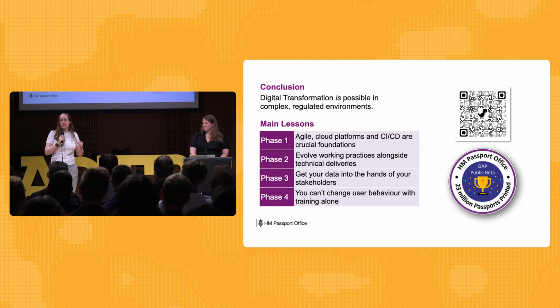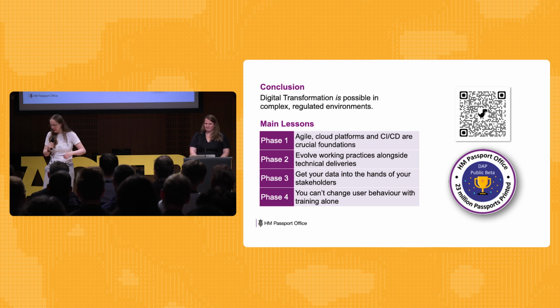One of the things we did was say, okay, you can see from your policies there are going to be over 100 tasks to do in this system. If we only take a week a task, that's over a year. So even if you're not giving them full estimation, show the complexity and get them to do some basic maths. That was the secret. But yes, I could entirely run a whole presentation on that.